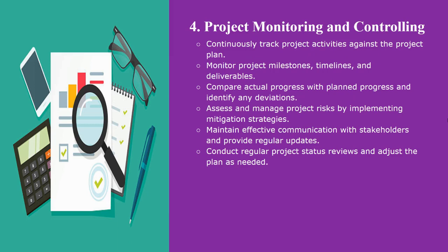It's important because we don't want to wait for the project to end before we do that. For instance, if you're implementing a project for 1 year, you wouldn't want to wait for the whole year to end before you come to check your project status to know how far you've done. But the reality is, if you do it for like 3 months, you come and check. If you do it for another 6 months, you come and check. That will help you know what you're doing well and what you're not doing well so you can make adjustments. Of course, if you wait for the project to end before you do this, there'll be no room for correction.